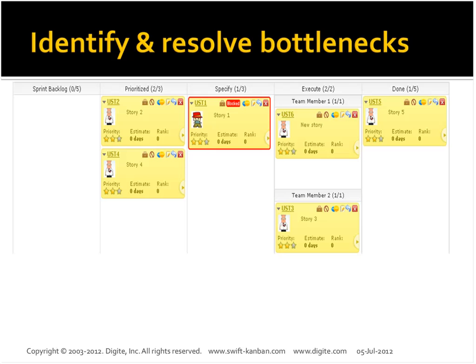A typical Scrum approach would have been that since something is not clear, we'll not even pick it up, or we'll just drop it from the sprint and pick it up in the next sprint. Whereas Kanban says you try and highlight that bottleneck and collaboratively work with the team wherever there is a bottleneck, so that you are able to resolve it and make it flow better.